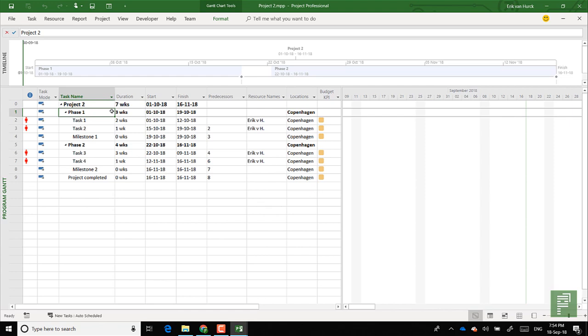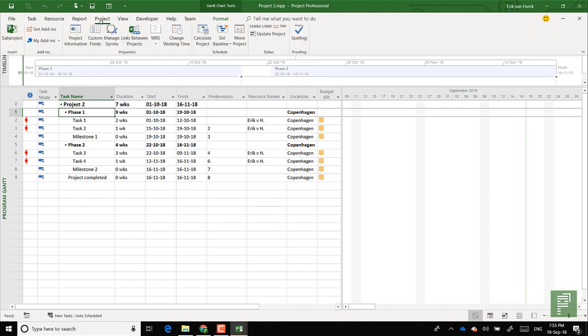and let it reflect that there are actually 2 projects that have assigned resources to it. Now when that happened, immediately there are 4 burning people besides the tasks, and this is because Eric is over allocated. He has 2 things that he does simultaneously. He has project 1 and project 2 being the over allocation.